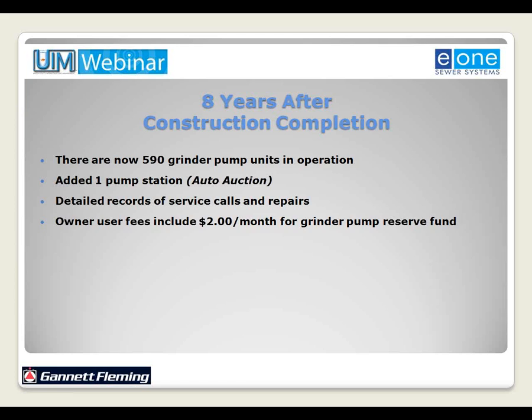So it was actually a customer or resident-driven request for the authority to put money aside for that rainy day when they did need the money to replace or repair a pump that needed some type of major repair. So the concept was actually a combination of customer requests, but borrowed from rural utility services. They generally have a requirement for a capital improvements fund where a percentage of the debt service over the 40-year life of the loan is put aside so that in year 20, sufficient funds are available to the borrower to replace or repair equipment that would normally only have a 20-year life expectancy. So we kind of borrowed a little bit of their philosophy in establishing that grinder pump reserve fund.